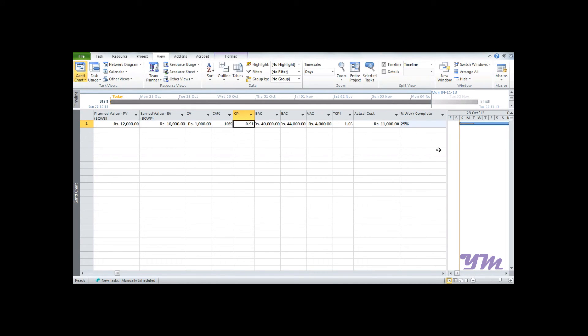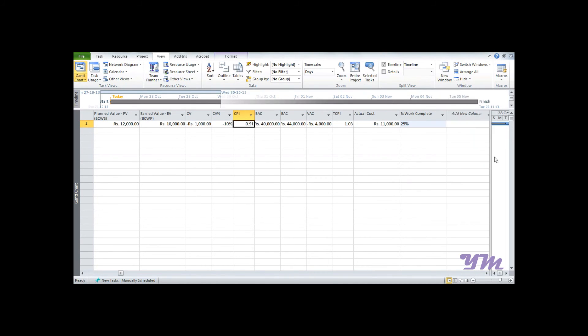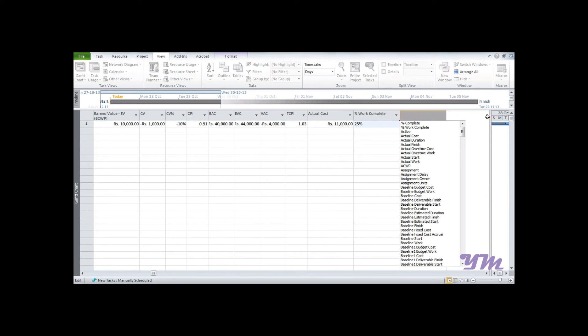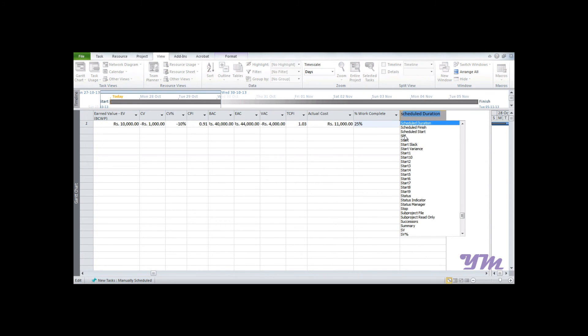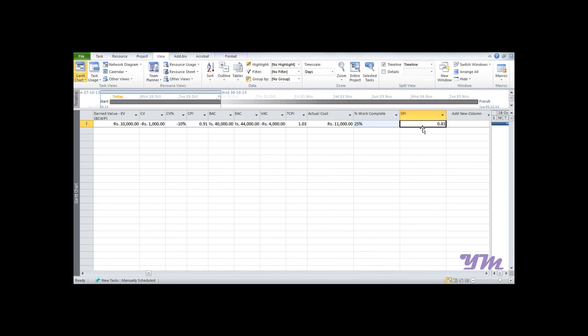If you want to find SPI, add a column for SPI, and you can see that it's 0.83, which is also similar to what we got in the previous part.